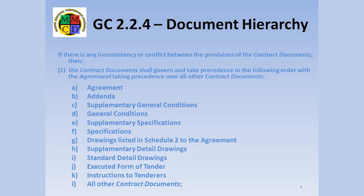Note that in the cases of the General Conditions, the Specs, and the Drawings, any issued supplemental of that class outranks the standard version. This is necessary to ensure there is a way to override standard provisions. Sections 2, 3, and 4 of the clause ensure that drawings of a larger scale, or with dimensions shown, or of a later date outrank their base version.